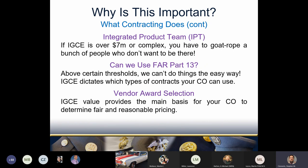If we can't do things the easy way, instead of using GPCs, micro-purchases, purchase orders, and FAR Part 13 BPAs, we might have to do a FAR Part 12 C-type contract, a FAR Part 16 IDIQ, or a FAR Part 16 BOA. The IGCE value is also the main guidepost by which COs evaluate vendor quotes for fair and reasonable pricing — this directly impacts which vendor is chosen and the product you get. If the IGCE value is off from the range of quoted prices, the question becomes: was your IGCE wrong, or were all the vendors wrong?